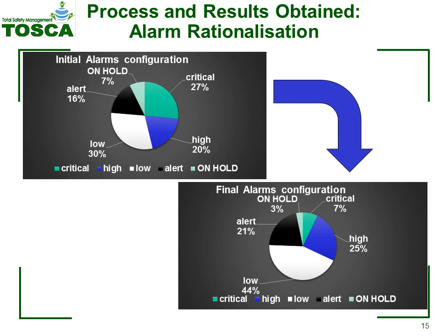The introduction of guidelines for the engineers also allowed the alarm rationalization workshop to be reduced by approximately 40% in time, since the engineers were fully prepared and all required information was available to classify the alarms correctly in the workshop. This allowed 200 alarms to be reviewed per day, compared to an estimated 150 alarms per day based on previous project experience. ABB Italy now dictates this methodology across all design projects.